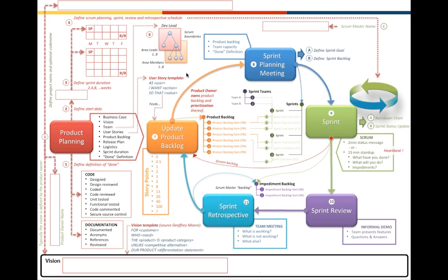When you know the velocity of a team, let's say my team's velocity is 30 story points, I multiply it by 5. So I know, as a scrum master, as a team member, and as a product owner, that I can only complete stories that add up to 150 story points for the whole release.